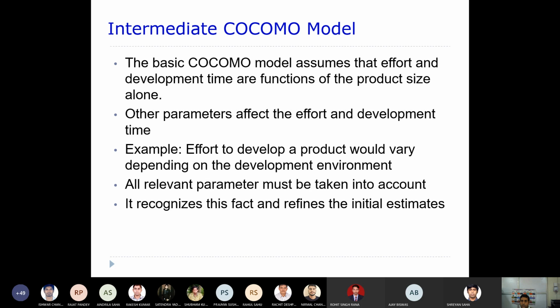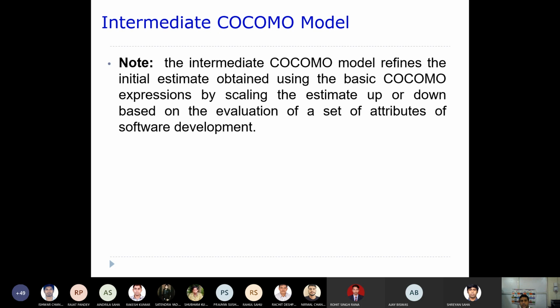Okay, you are going to come up with better estimates, right? So note, the intermediate COCOMO model refines the initial estimate obtained using the basic COCOMO expression by scaling the estimate up or down based on the evaluation of a set of attributes of software development, right? So now, whatever the other attributes...